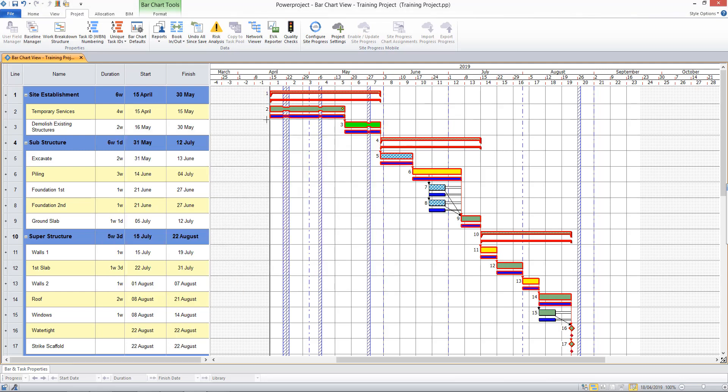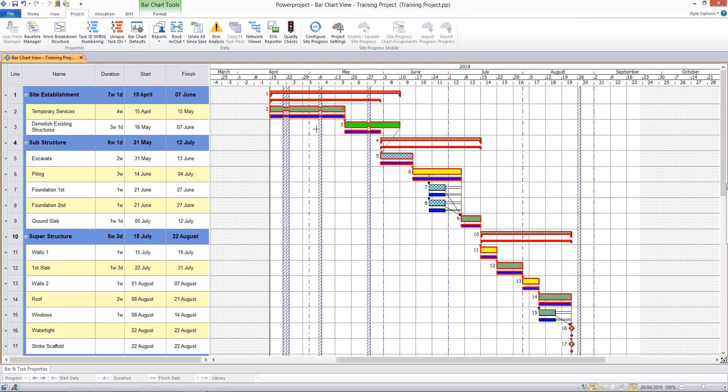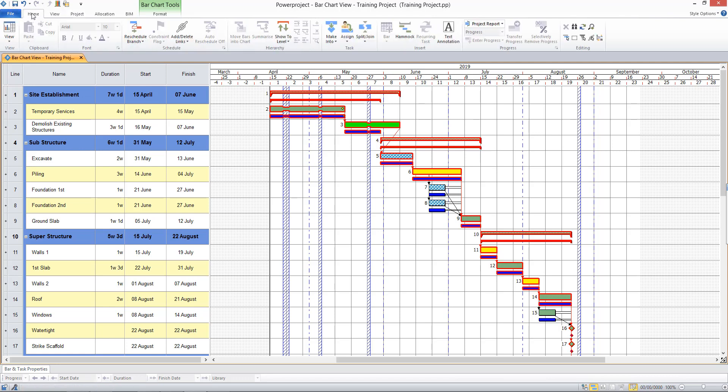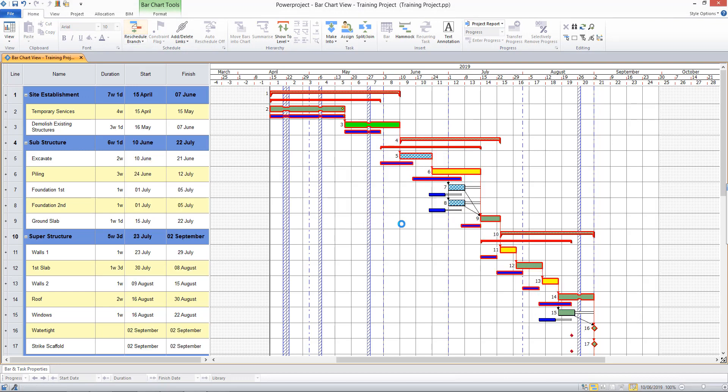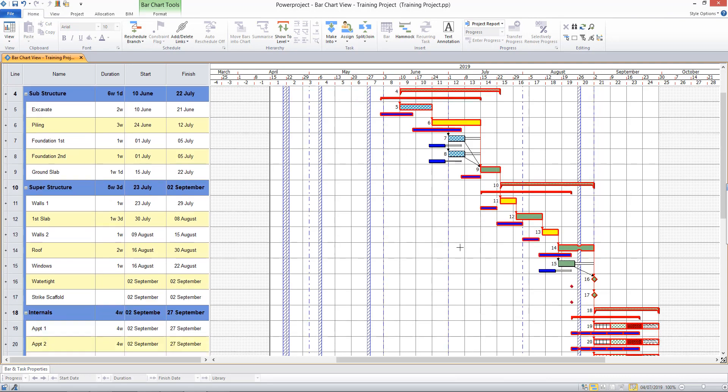And so we now see this blue line representing the baseline or the planned version of events. If my live project is to change, I can demonstrate by just making a change to the duration of a task and I reschedule. Notice how the baseline shows me the original positions of the tasks and allows me to clearly identify any variance visually on the bar chart.